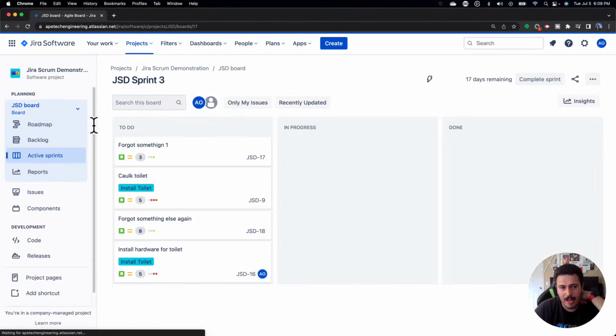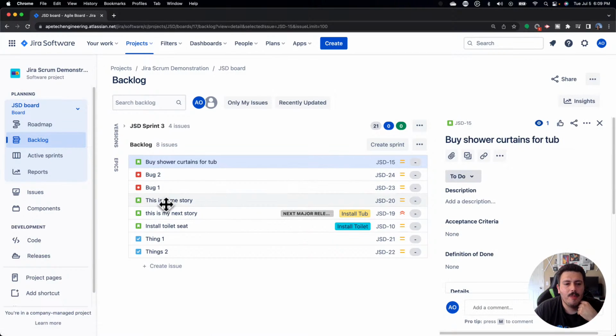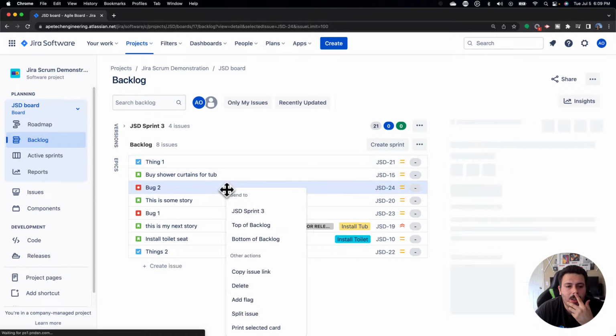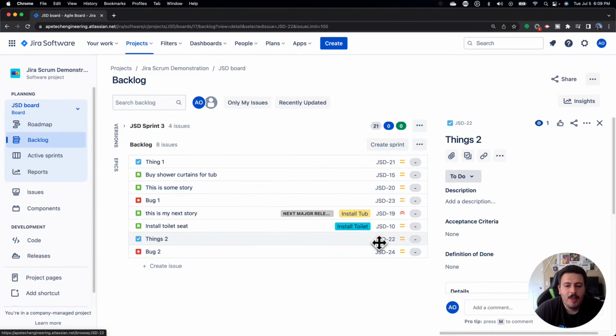So let's go take a look at that backlog now that we've added this. And so this stuff here should basically update itself, so that if you're not ranking yet, your priorities is going to dictate what comes through. So very important that you consider this. I would personally only leave the rank because, as you can see, if you order by your priority, this is okay the first time, but the second you move something to the top of the backlog or you move something down to the bottom of the backlog, your other order essentially gets broken.